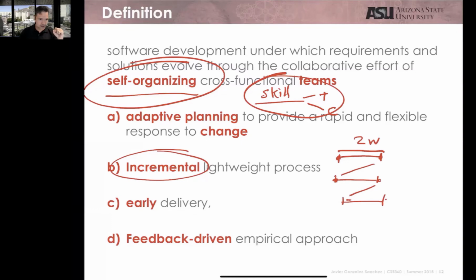Every 2 weeks, you're going to be able to do 2 things. Number one, show the customer a beta version. Show the customer the result, what you achieve in those 2 weeks. Moreover, because every 2 weeks, you start again with new requirements, every 2 weeks, you are able to apply changes. Think about it.